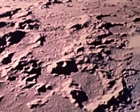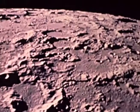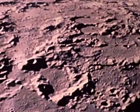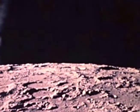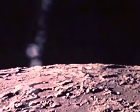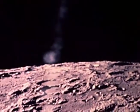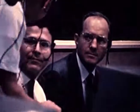It was found that depressurization could not be accomplished. Inability to draw a vacuum in the tunnel resulted in an air-bearing effect in the seal between the two vehicles. This in turn caused the lunar module to rotate nearly 3 degrees from its proper position. If the movement had continued to 6 degrees, the mission would have been aborted. After carefully weighing the information, the alternatives, and the hazards, Mission Control and the astronauts decided to proceed as scheduled.